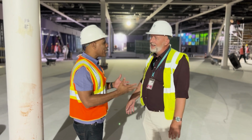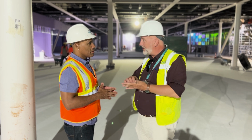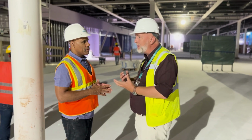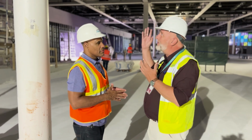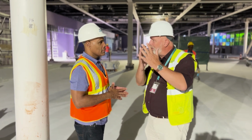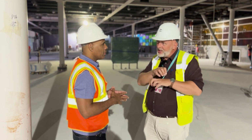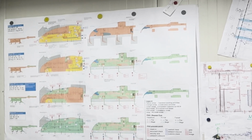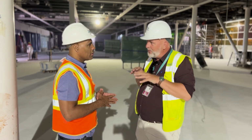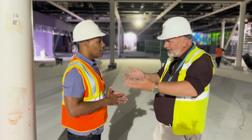So do you guys have to do an inspection walk around every day to see what's done, what's not done? Yes, the supervisors that we also just met are invited by the contractor to do inspections on quantities. But we also have our bi-weekly safety walk-downs for the safety aspects with the management of Ballast Nedam and the project management unit. And yes, we have various coordination interface visits to see, hey, we find something here, it's not on the drawing, because everything starts with a drawing. Also for this project, the architect made drawings, but that's the intent. The contractor needs to make shop drawings to combine a door with a wall, with a light fitting, and all those drawings come together in what you see here. So our team, myself and the others, we walk around to check, is this 5 centimeters or 10 centimeters, make adjustments, call the construction manager, make a new situation, and then we finish.